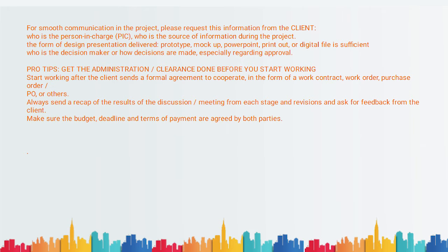Pro tips: get the administration clearance done before you start working. Start working after the client sends a formal agreement to cooperate in the form of a work contract, work order, purchase order, or pre-order, or others.